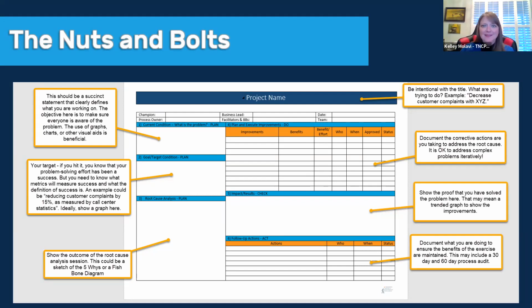I will tell you a secret. In the organizations in which I do this, I tend to say that anything that requires any type of IT programming beyond maybe creating a new report, but anything that requires database updates or capturing brand new information that hasn't been captured before, updating workflows, that takes that IT involvement, I typically say is a high effort, primarily because IT work is bigger than just this one improvement.